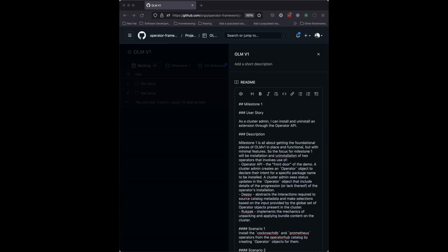I think it probably makes sense to put a time limit on deciding, right? Let's make an issue or whatever we want to do to organize our thoughts, and then say, by the end of next week or whatever we decide, someone will make a decision and say, that's what we'll do. That might not be the best decision, but we'll put it into practice. And if the community sees that it's not ideal, then we'll have the discussions and we can tweak the process. Okay.